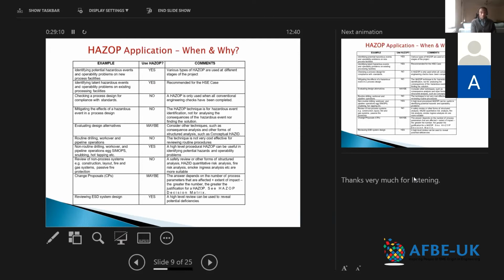And you'd be doing a very coarse HAZOP at that stage because obviously you don't have, as we said earlier, mature PNIDs to use, but you'll be doing what you have. You can even use the PFDs, just walk through the PFDs, process flow diagrams, that is, and whatever PNIDs you can knock up at that early stage of the design. You use those to do a coarse HAZOP, determine what configuration is best for your project or for your design.